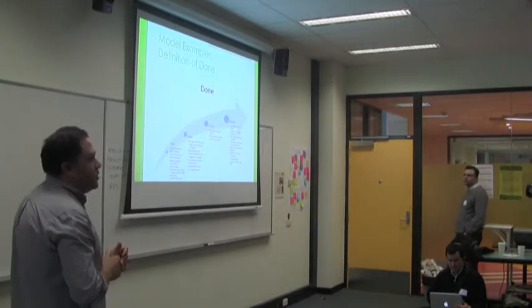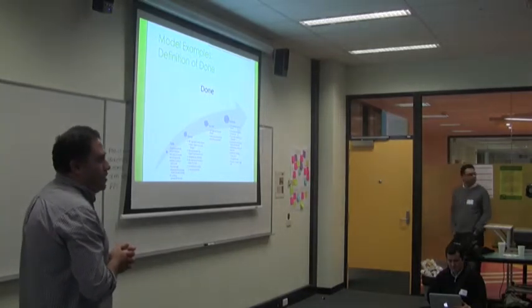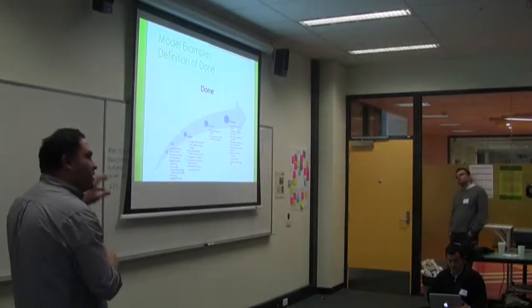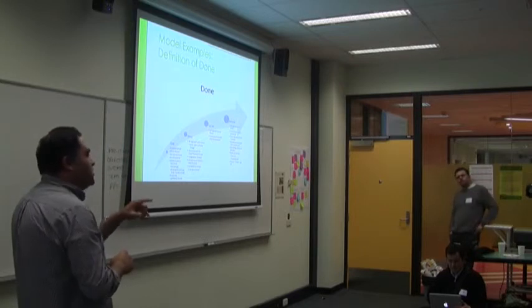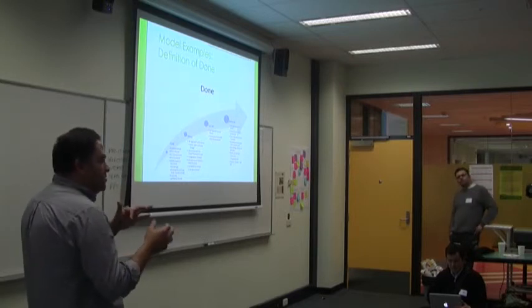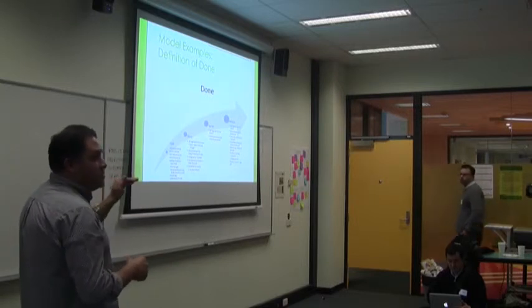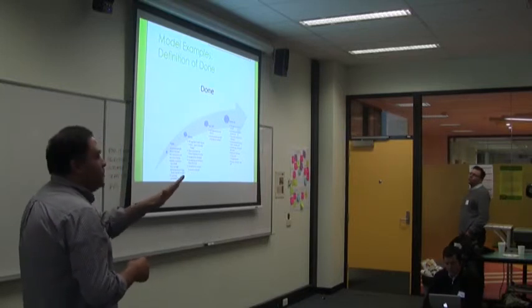And root cause as well, if you have a defect, usually it traces back to a systemic or an architecture problem. Yeah, exactly. So we were running Kanban at the time, so we had an express lane, and we said, okay, our default position is, unless it's an edge case that is low risk, it goes straight into the express lane and gets allocated to the developer who's best assigned to it, and they stop what they're doing and fix that and push it through.